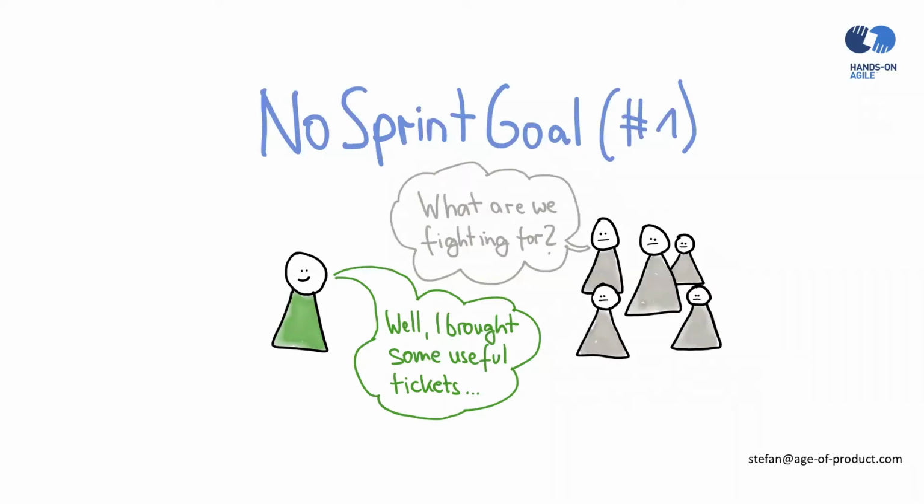And I believe that the metric is: yes, we were able to define a meaningful sprint goal. And by sprint goal, I'm not just referring to a random assortment of stuff, like we want to make the site better, but a specific sprint goal that can be achieved, that is measurable. If that is no longer available, you should really think about moving on, probably to a different form of working. Maybe Kanban is something better for you in this case.